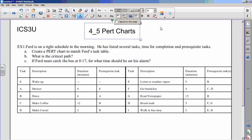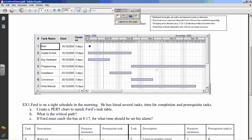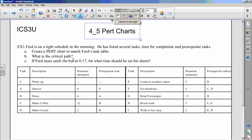FURD is on a tight schedule in the morning. He has listed several tasks, time for completion, and prerequisite tasks. The goal is to create a PERT chart to match FURD's task table. We want to find the critical path, and if FURD must catch the bus at 8:17, for what time should he set his alarm? These are all the things he does in the morning, and we need to find the latest he could get up.